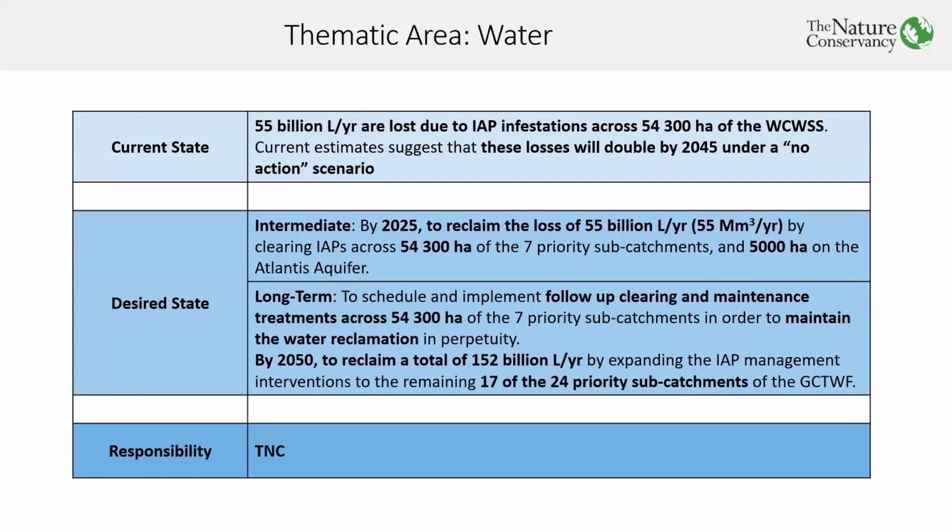As I said, for each of the thematic areas, we've identified the current state as well as the desired state, and assigned responsibility for the thematic area. And in terms of the desired state, we looked at both the intermediate, a short-term or medium-term desired state, and a long-term desired state. The intermediate desired state coincides with a high impact phase for the water fund, which is the first 6 years of the Greater Cape Town Water Fund.